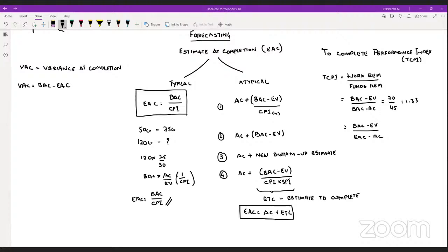Yeah. So the meaning of termination or completion is that you can say a project is terminated or completed when all the work that you have planned is completed. If all the work that you have planned, the planned value, is equal to earned value, if you have earned all the work, then in that case SPI should be one. So once the project is closed out, when you say project close out, your SPI should ideally become one.